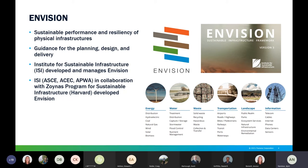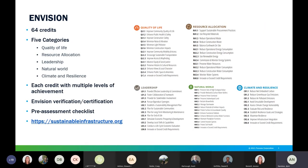Envision is applicable to the entire gamut of infrastructure projects — both public and private — from projects valued at less than a million dollars to multi-billion dollar projects. It includes 64 sustainability and resilience indicators called credits, organized around five categories: quality of life, leadership, resource allocation, natural world, and climate and resilience. Each of the 64 credits has multiple levels of achievement, from slightly improving beyond conventional practice to conserving and restoring communities and environments. The project team assesses achievement in each credit and identifies opportunities to pursue higher performance.